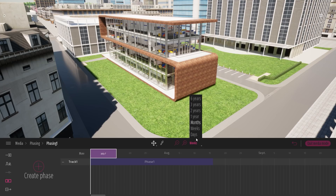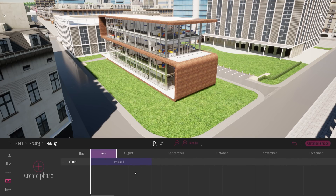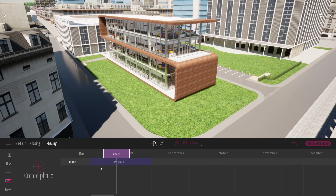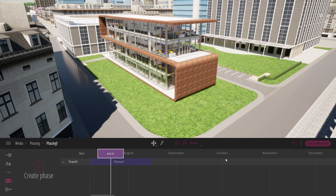You can also use the drop-down menu to switch to a view on a daily, monthly, or yearly basis. Next, we have the timeline — it accumulates all the phases below the white line. And here you have a track, which is where you create all your phases. You can create multiple tracks. A track could be for a specific task, like a crane that needs to be present for a set amount of time, or an excavator present for a couple of months. Let's start creating a couple of phases and explain more.